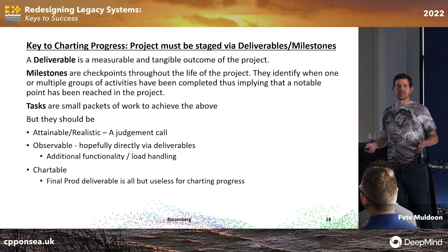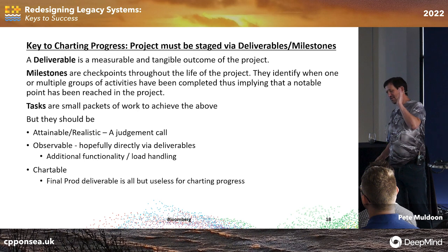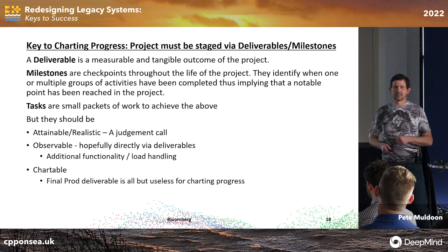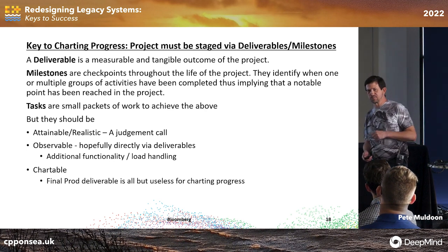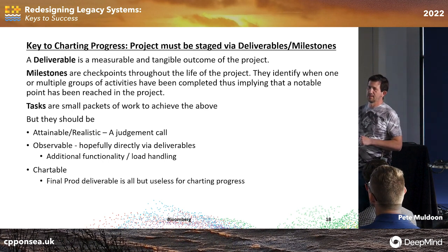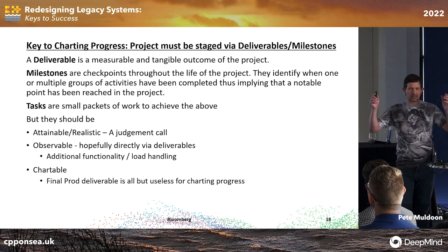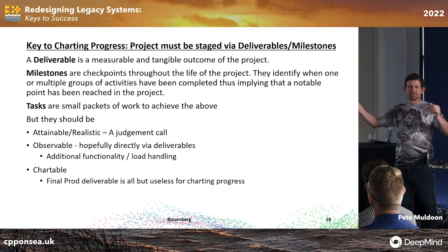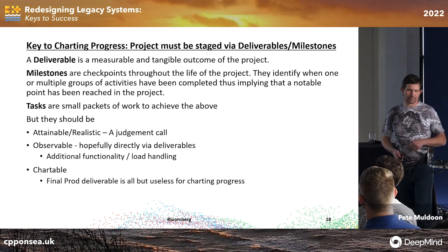I liken it to building a house. You have a green field, and you say, I want to build a house. You say to the architect and builders, here's the plan. When will it be ready? I'll be ready in 6 months. And I go away and never come back. 6 months later, I arrive with a trailer with all my stuff in it. There's probably not going to be a house to move into. Instead you say to them, listen, the first thing I want is the subfloors. Then I want the framing. Then I want it dried in. Then I want to see the plumbing and everything. As long as you have all these milestones, you can check where you are and how far behind you are. Same with programming.